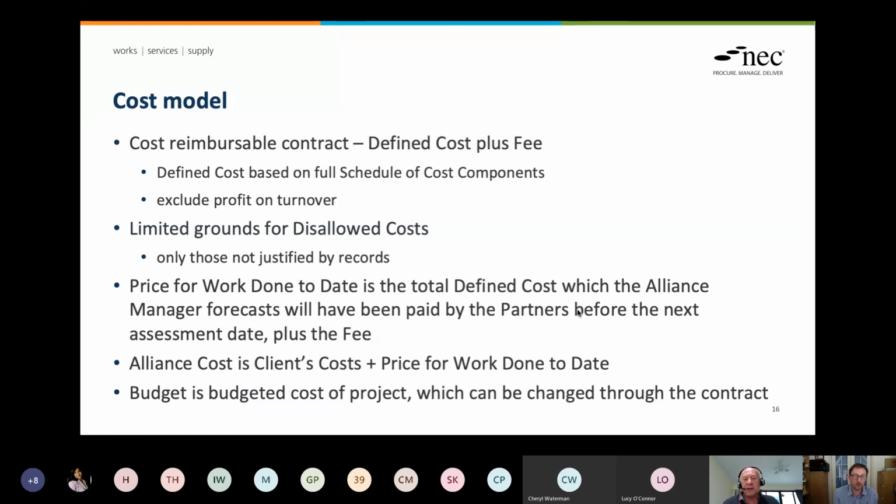Therefore, everything else is not disallowed. If you remember things from ECC like correcting defects after completion, that's disallowed. Not complying with the constraint on how the contractor provides the work is not disallowed. Excessive resource is not disallowed. You are absolutely up to here this time. You've got nowhere to turn. Go back to taking care in the first place, but very limited grounds.